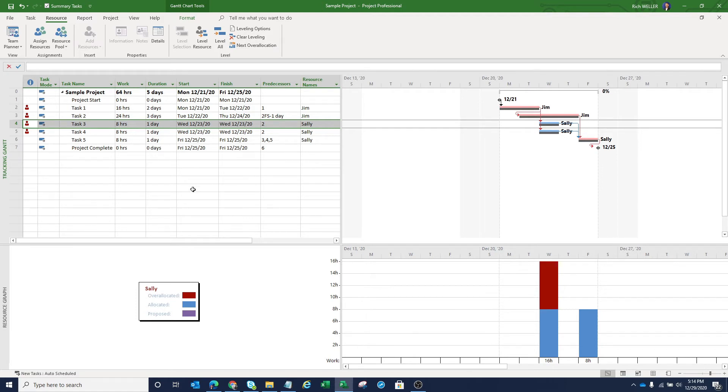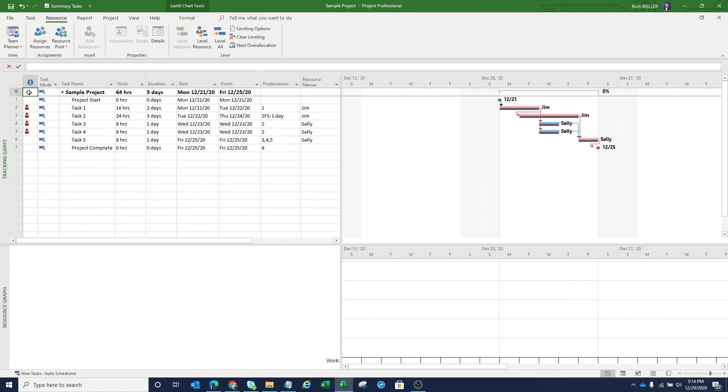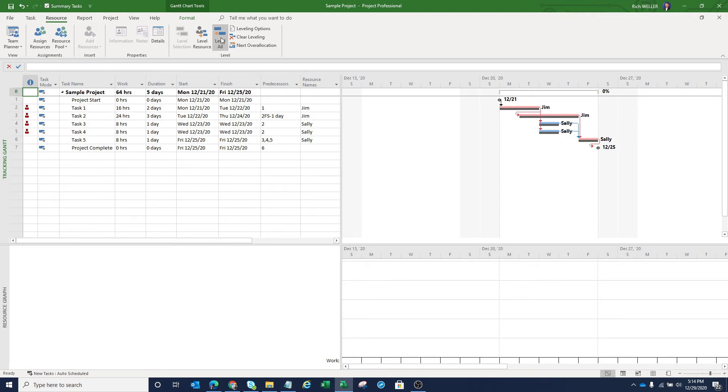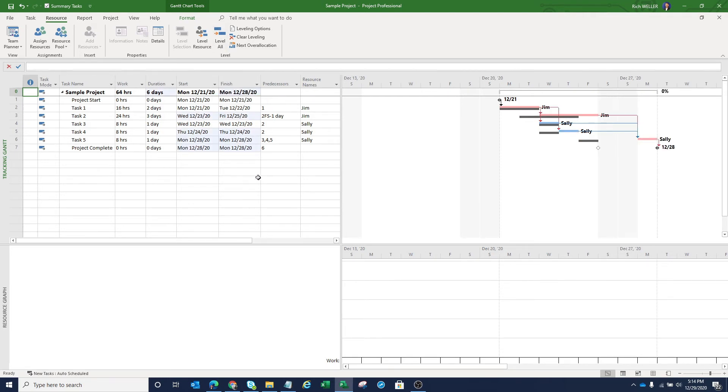You can see from this little schedule here that we have two over allocated resources in this project. Now we'll perform that resource leveling technique as defined by the Project Management Institute. We can do that right here within Microsoft Project. In order to perform that, we can leverage the out of the box configuration of Microsoft Project and simply say level all. And you'll notice with just one click, all of the heads have now disappeared.